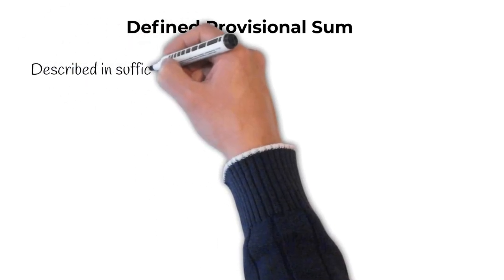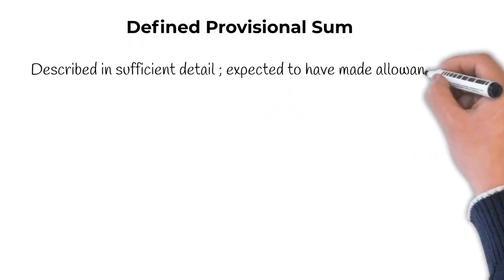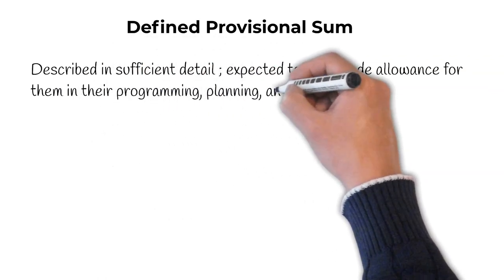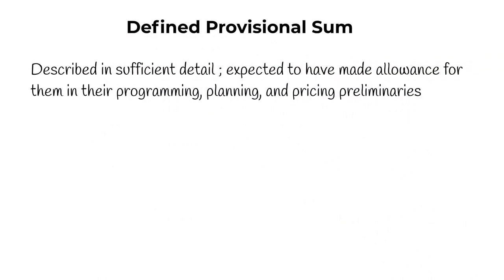Defined provisional sums are those that have been described in sufficient detail that the contractor is expected to make an allowance for them in their programming, planning, pricing and preliminaries. The work may not be completely designed, but the following information may be known.